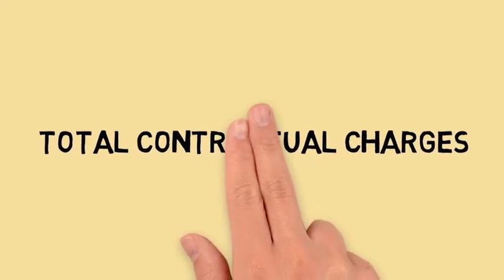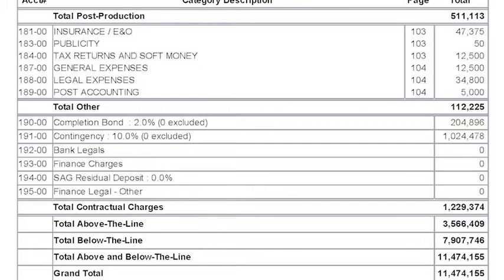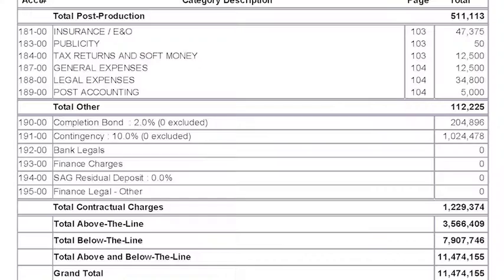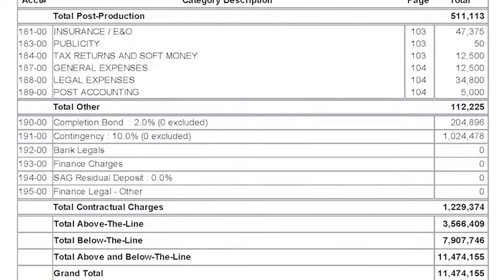Finally, we come to total contractual charges. These can vary — in this budget a few are zeroed out because we don't have figures yet. But this includes the completion bond so you can finish the film, a 10% contingency, the cost to bank various incentives or pre-sale contracts, minimum guarantees with the bank, and the financing charges that apply. The Screen Actors Guild also requires a residual deposit these days, which is difficult for many producers because you're paying residuals before you've even shot the film.